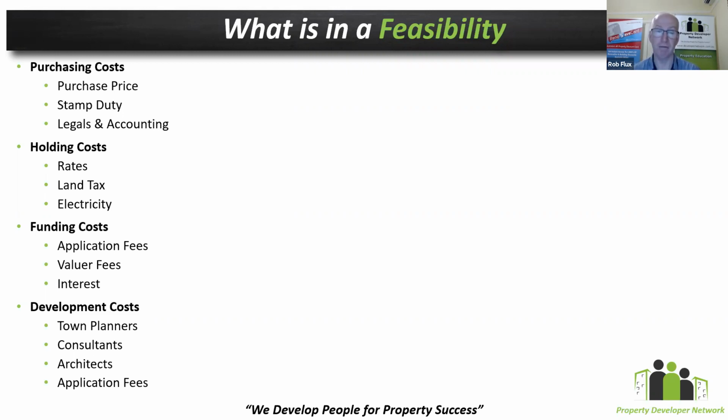And that may go back and forth a number of times if council are asking you lots of questions about your particular development, and you may have to re-engage your consultants many times in the process to answer council's questions and resubmit through a thing called an RFI, or request for information. So you need to make sure that you understand the complexity of your project. Is that going to be a quick approval process and not many questions come through, or is that quite a complex approval and you need to anticipate a little bit more budget for each of those consultants as you go.